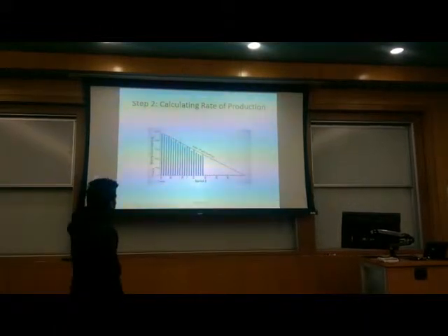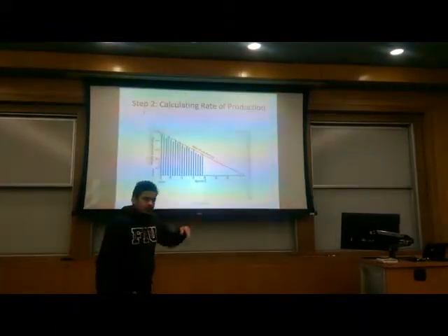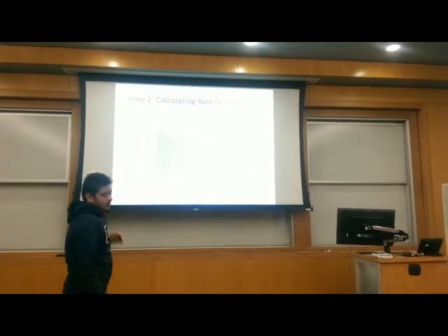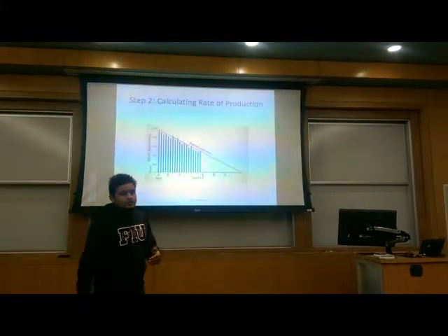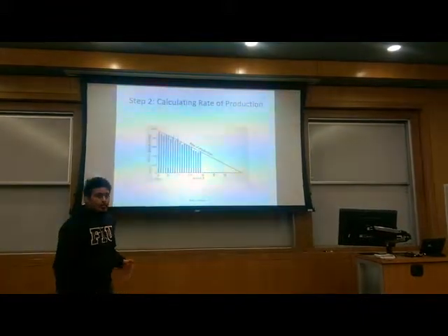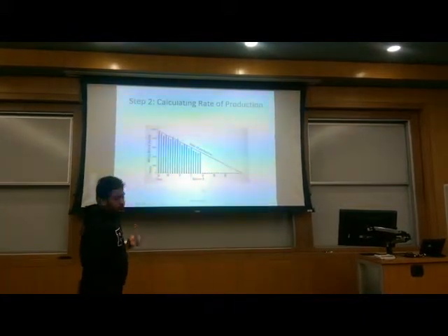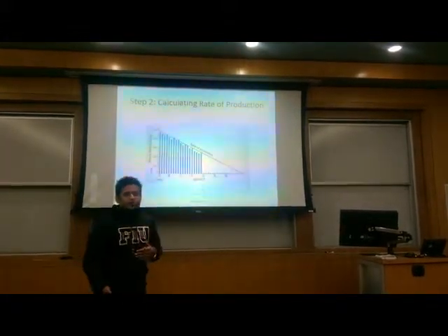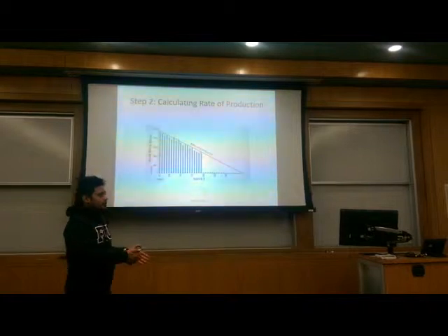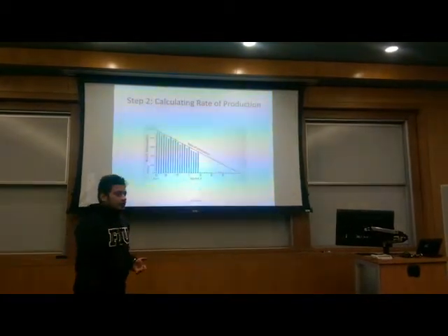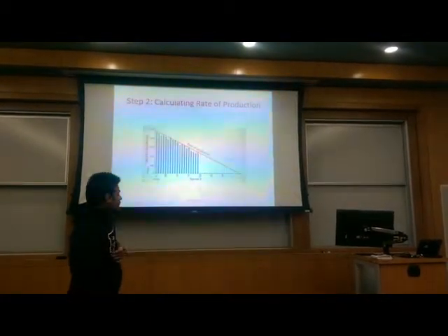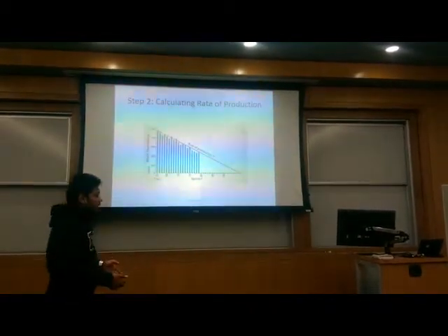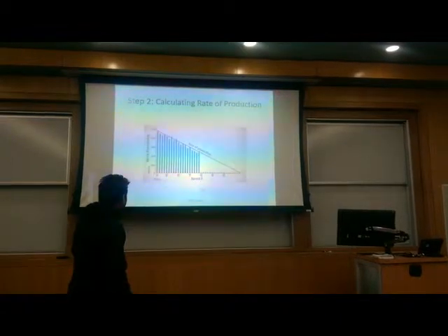And we can see it's not a steady graph. It's going in a decreasing order, every day just going down, but it has ups and downs. That means we have hurdles. We have some problems coming up in the project, so that increases the time. If you are working on a sprint, on a user story, for which we have done 50% of the work, but suddenly it goes up, there's some problem. So the time increases for the user story.